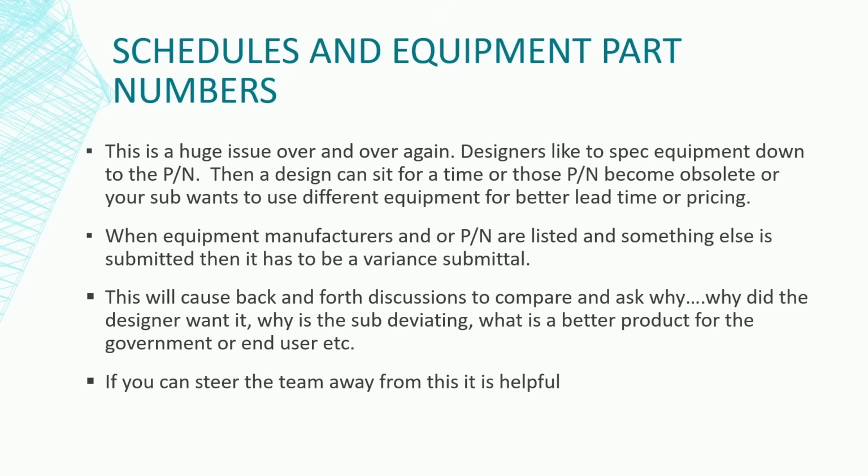And I know you're saying it's just a note in the equipment schedule. I've heard that over and over again, and I've seen it screw people over and over again. When the sub wants to submit something different, make sure it goes in as a variance.